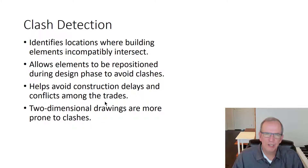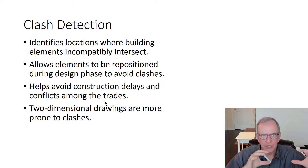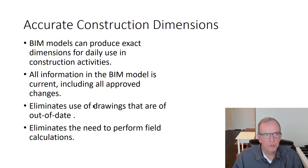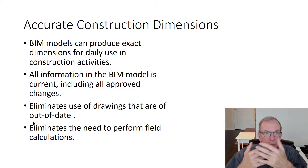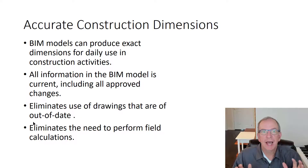2D drawings are very hard to visualize — like elevations are much harder to work with in two-dimensional drawings compared to a BIM model. There's no comparison. It builds confidence and allows us to do a lot more prefab work with more accuracy, eliminating more of the need to perform field calculations. Add the advances in scanning technology — if it's an existing building, you can scan it and integrate that scan into the model to make sure what you're designing for matches exactly what's there, with very small differences in tolerances.